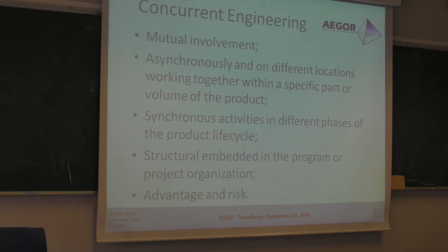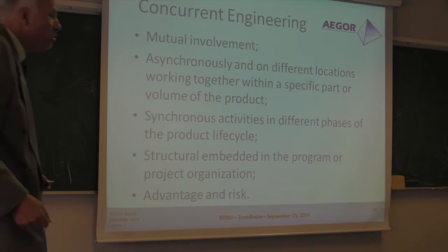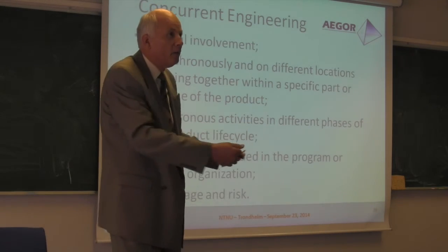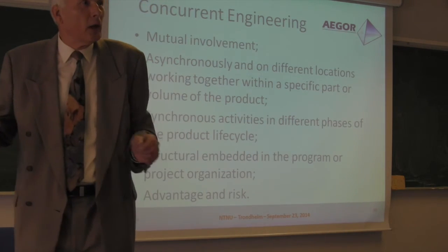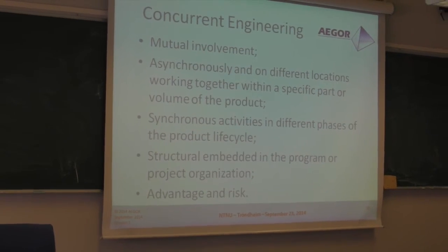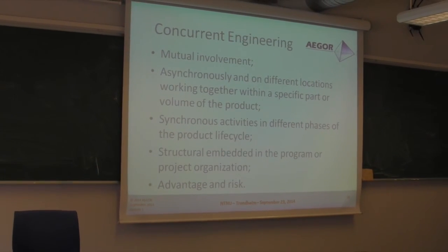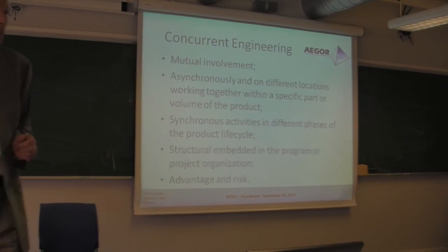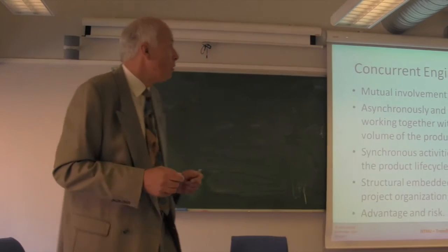People from manufacturing went to the drawing office, saw this drawing, and went away with it because they wanted to speed up the process. So they did it, and the consequence was that when there was a change, these 80,000 guilders had to be paid by manufacturing.